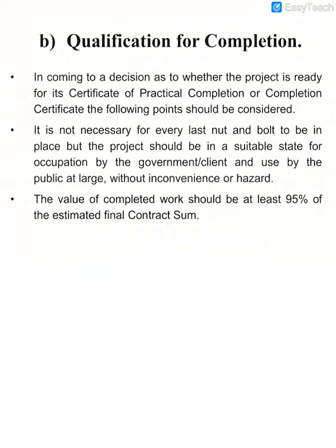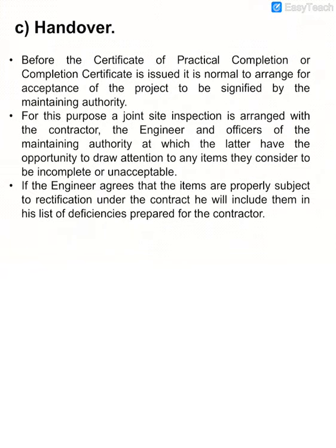Alright. And then number three is the handover process. Before the certificate of practical completion is issued, it is normal to arrange for acceptance of the project to be signified by the maintenance authority.